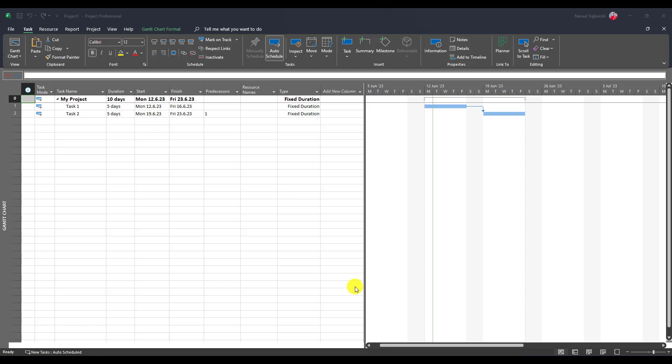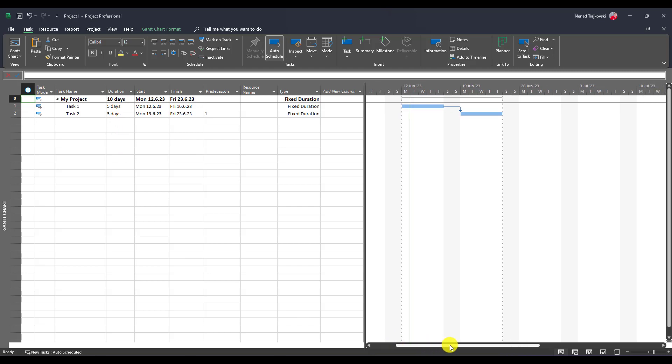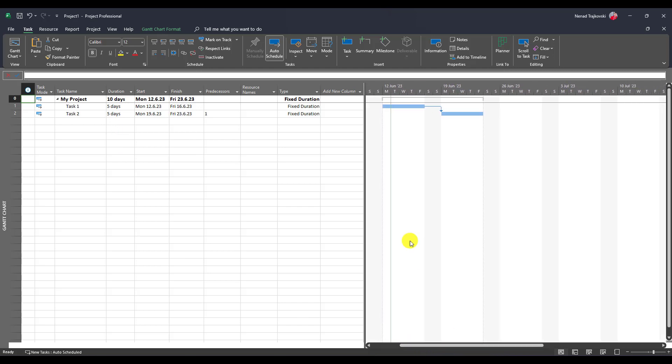You can see that I have two tasks here, both of them are fixed duration type and both of them have five days duration. You can see that I link them in a simple manner, finish to start, so task one should be finished before task two could start.